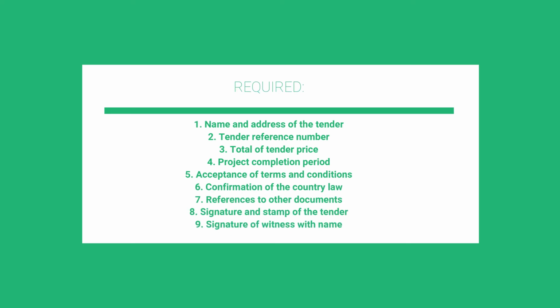A form used by tenderers to enter the tender. This form must be completed with the tender price and the completion period of the construction work to be done by the contractor. This form is available in the tender document, in the form of a letter from tenderers to the client, stating willingness to perform work in accordance with the price and construction period for this project.